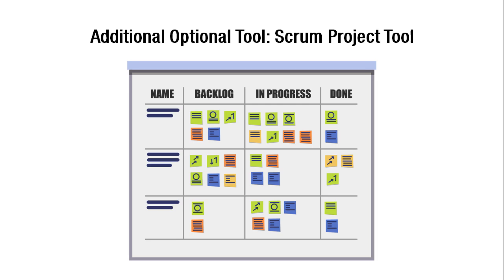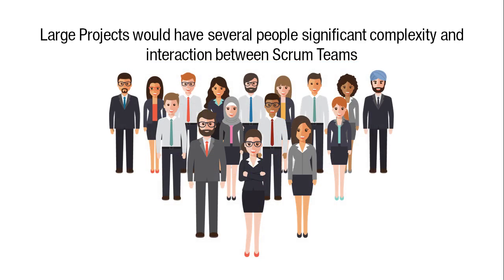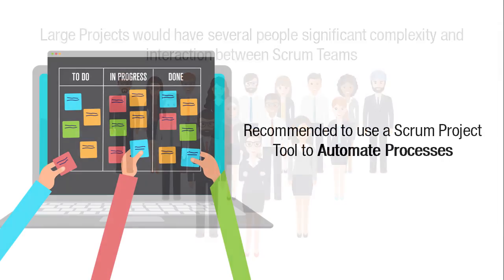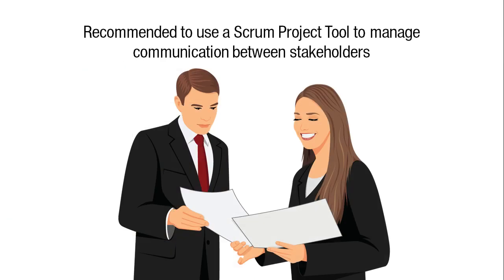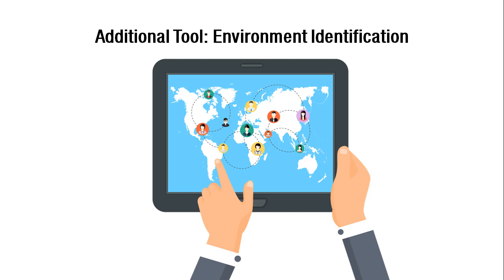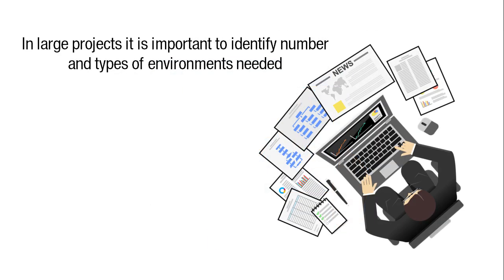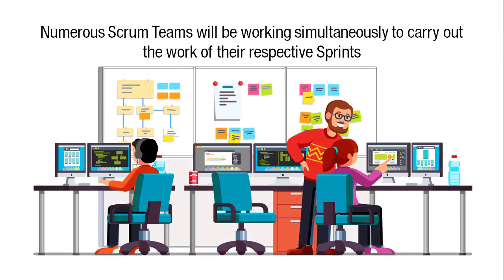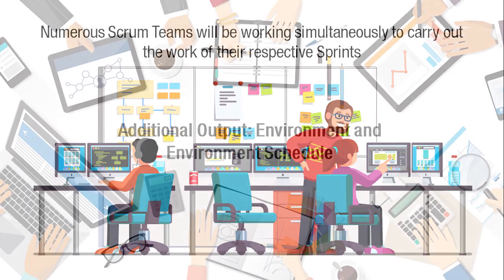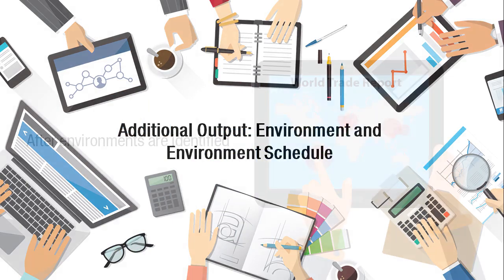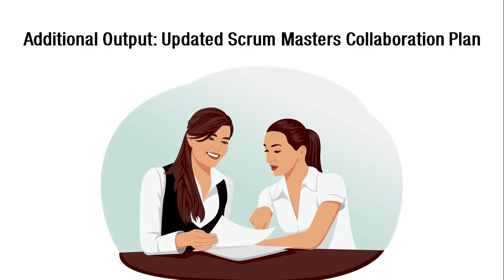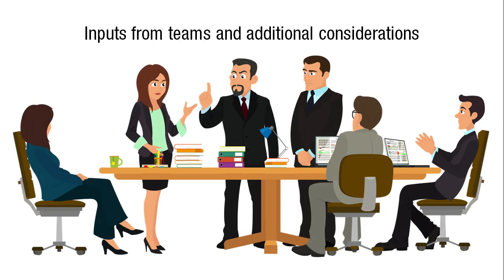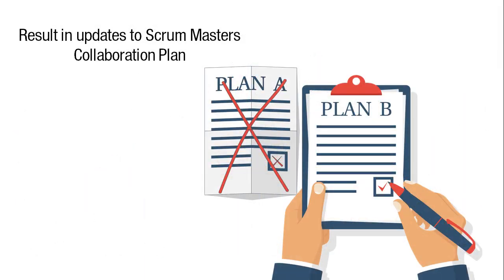An additional optional tool is the Scrum project tool. Since large projects would have several people, significant complexity, and interaction between Scrum teams, it is recommended to use a Scrum project tool to automate processes, manage complexity, generate reports, and manage communication between stakeholders. An additional tool is environment identification — in large projects, it is important to identify the number and types of environments needed, because numerous Scrum teams will be working simultaneously to carry out the work of their respective sprints. Additional outputs include the environment and environmental schedule, which is used for coordination of sprint activities across teams, and the updated Scrum masters collaboration plan, as inputs from the teams and additional considerations will result in updates to this plan.